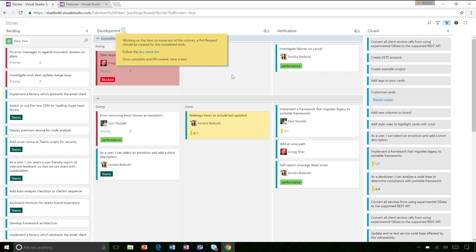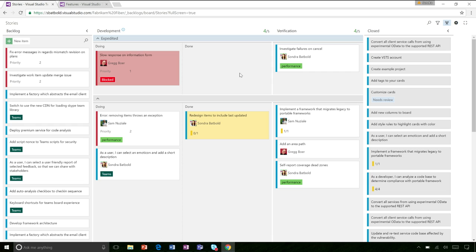You'll know that a work item has moved into the done column because it has a pull request and it's met all the criteria on the dev checklist. And then you can move it into the verification column once it's done.